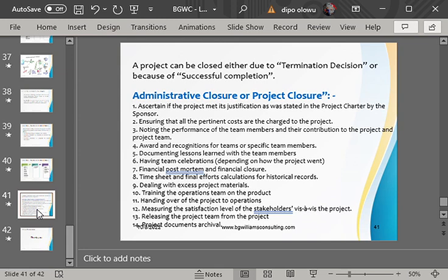When we approached the new project sponsor to brief him on the status and progress so far, what he said was, I don't think I am in support of that project. It is not in line with my current vision. Hence, the need for you to truncate the project. All of us were just looking at ourselves. There's nothing we could do. Why? Because of convenience. So when we say termination decision by convenience, we are simply saying that because the organization no longer wants that project, they say don't worry, leave it. And that is exactly what is happening in our government sector.